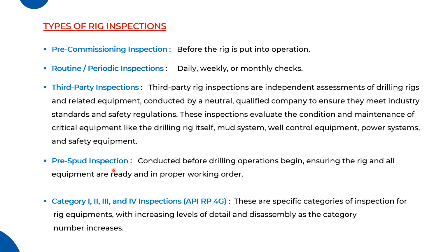And in this inspection there are many things to ensure that all the equipment of the rig, mechanical equipment, drilling equipment, handling equipment, are okay. They have OEM inspection certificates available, and all the safety gear and safety equipment are operational, and all the drills have been completed at the rig site as well as in the main camp.